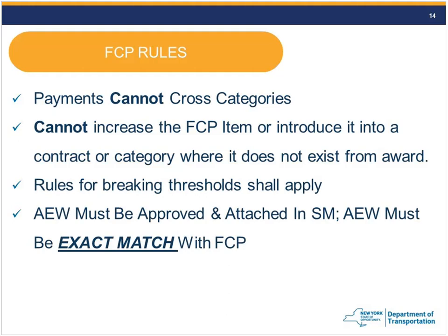An AEW must be approved and attached in Site Manager. The AEW must be an exact match with the field change payment, with the FCP. It has to match item for item, quantity for quantity, dollar for dollar. That's one of the rules because then you're having this pre-approval and it matches the FCP. So that's one of the special rules that apply to the FCP.